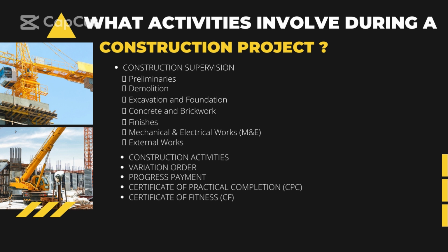There were many cases about delays in issuing the CF by the local authorities. Due to these complaints, there are many suggestions including cancellation of CF by the local authorities and replacement by approval from professional bodies. The main reason for the cancellation is to ensure the development, especially the buildings, were built accordingly, follow the specifications, and are safe for occupation.